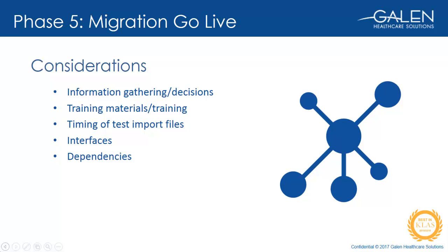Timing of test import files. When migrating data into the test environment, the GALEN team can time how long the messages take to generate and then how long it will take to load them, especially for larger sets of clinical data, such as results and scanned documents. This is very important information to have, and it definitely will drive the data migration timeline.